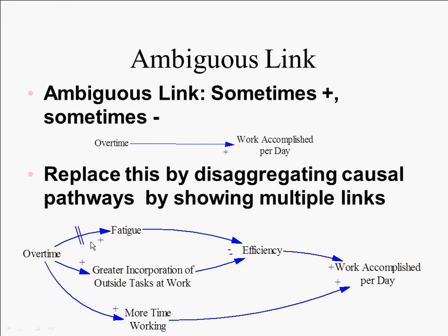Modeling fatigue as a stock and showing how it changes over time. And it reflects the fact, incidentally, that fatigue is a physiological phenomenon that people have tried to quantify with indices, and you can actually quantify over time the amount of time it takes to reach a certain level of fatigue. It's notable that this effect is oft ignored in some sorts of projects, so people pay attention to this effect, and eventually this effect starts to dominate, and you start to get less work accomplished per day.